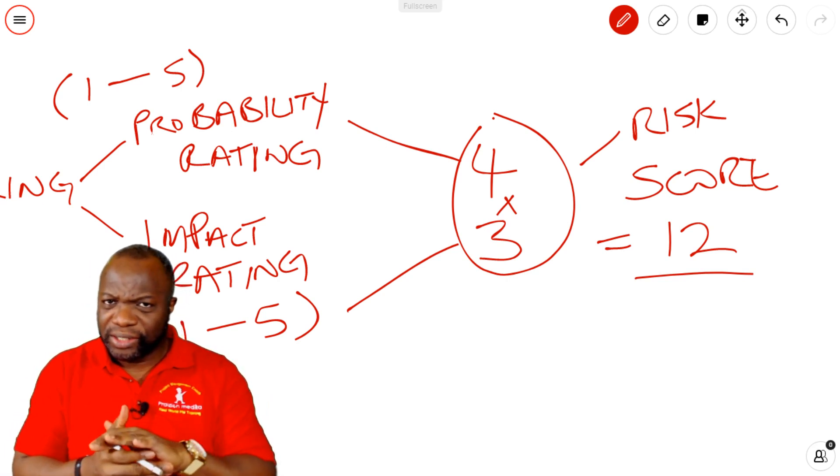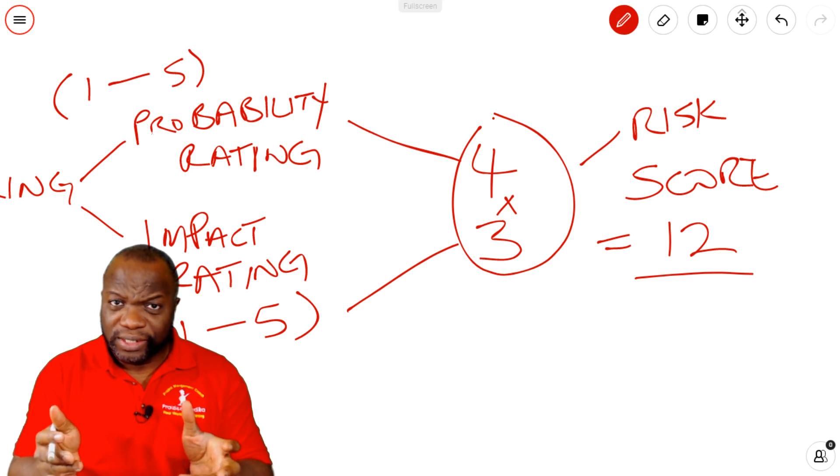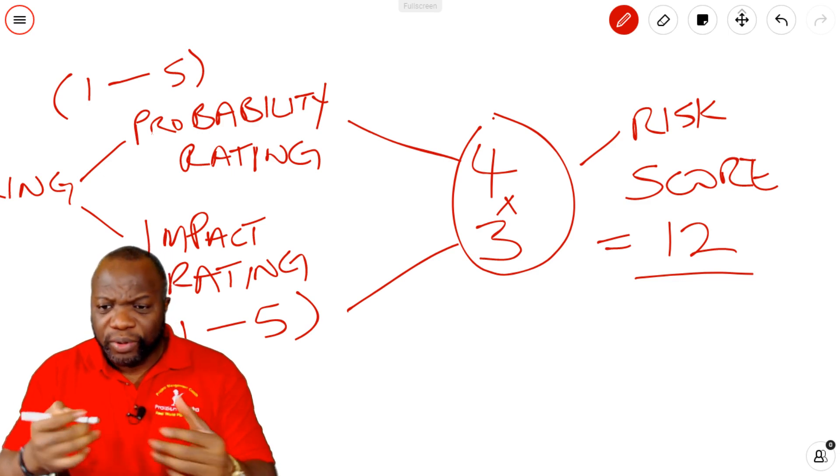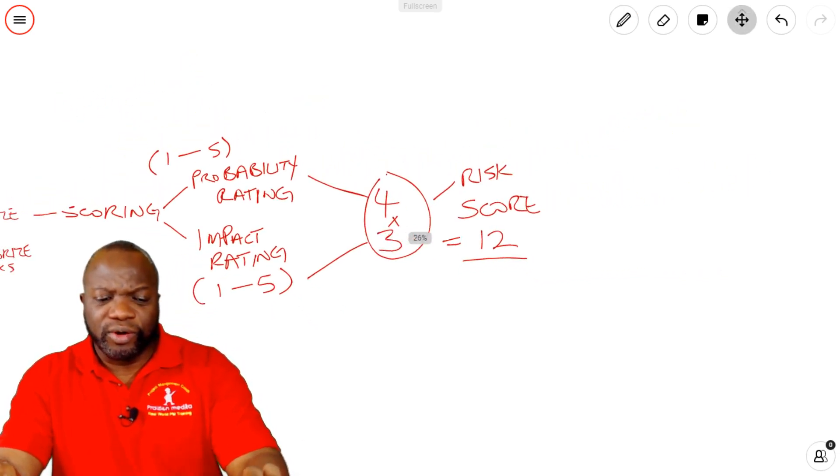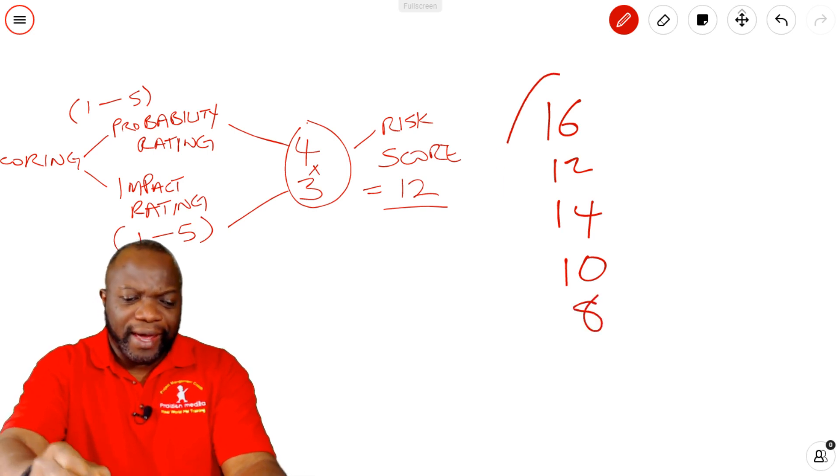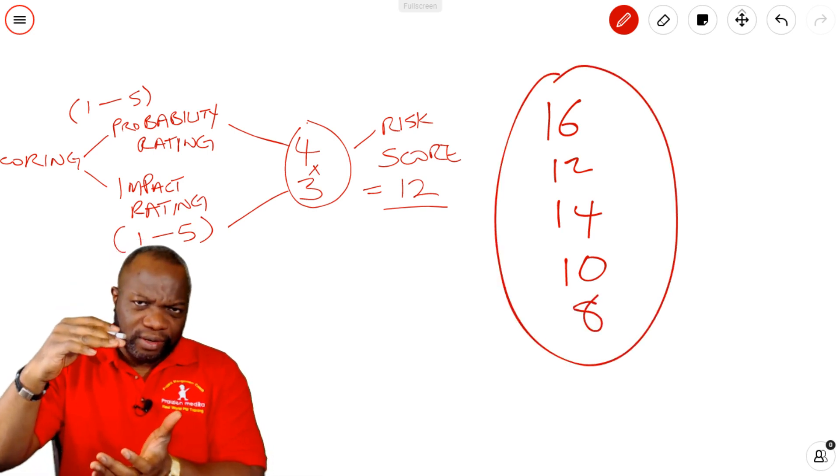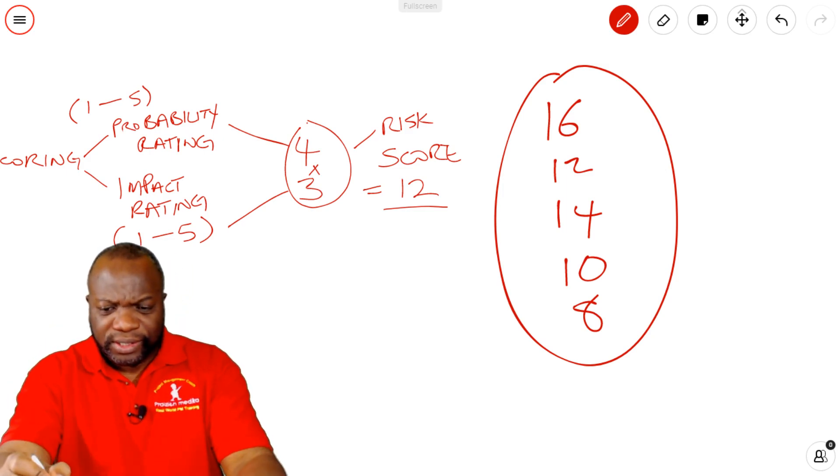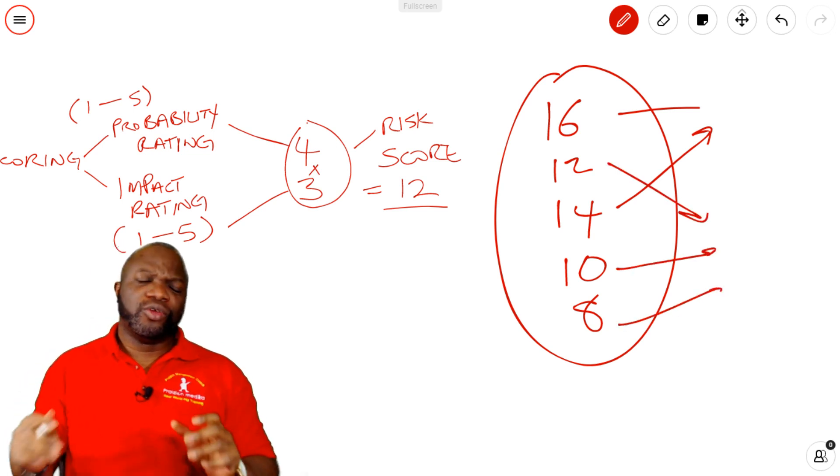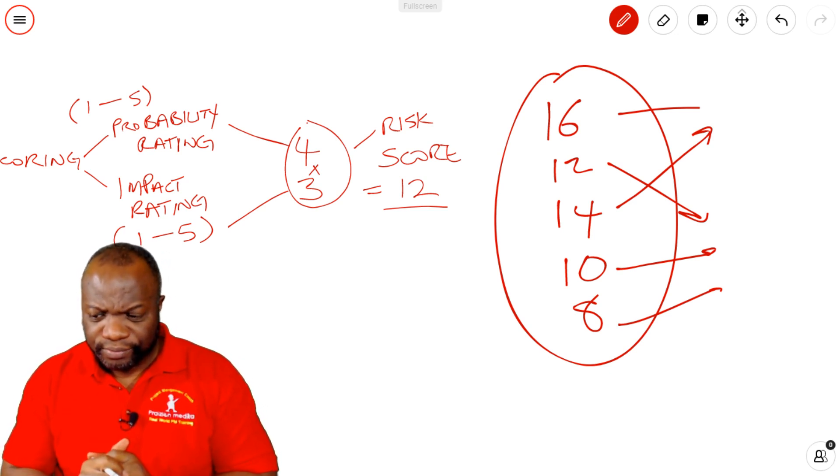This 12 is not quantitative, my friends. There's a misconception that because it has numbers, it's quantitative. No, it's not quantitative. It does not convert over to other projects. It doesn't mean anything on other projects. But for our project, it helps us with the relative ranking of risks. So if we have one that's a 16, one that's a 12, one that's a 14, one that's a 10, one that's an 8, we can rearrange the risks. Rank the risks. So the 16 stays at the top, the 14 goes next, then the 12, then the 10, then the 8, and so on. You use this to order risks.